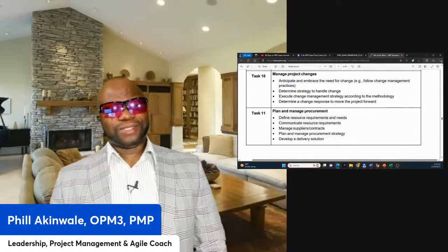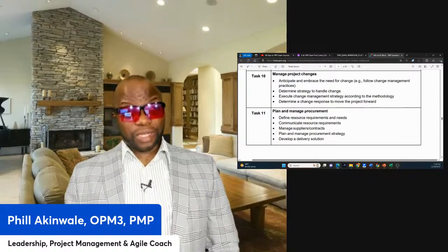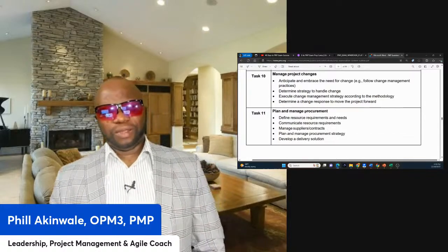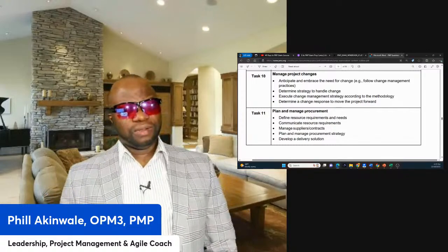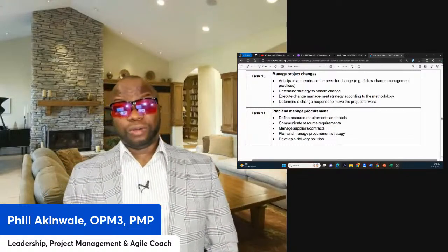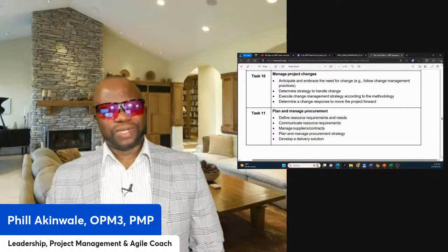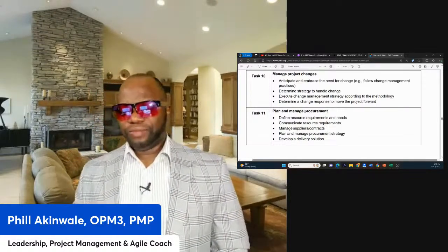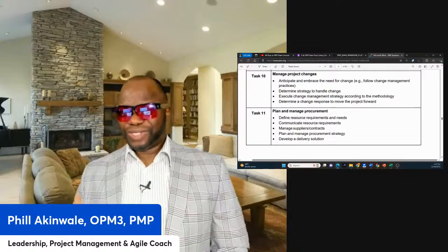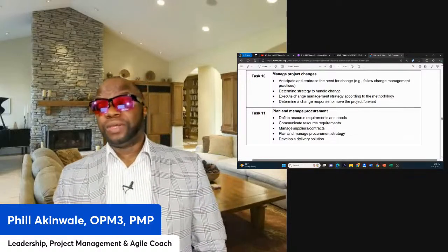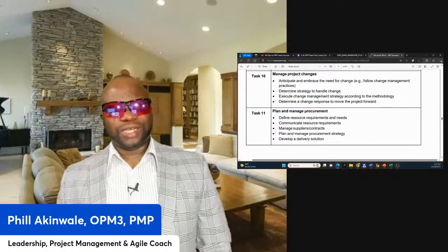They do the analysis. They take a look. They could be back and forth between you and them or the customer and them. They may negotiate other things with the customer, but ultimately there's going to be a go or no go decision in this case. Should we go ahead with the change request or should we not? And if they don't go ahead, then you still document the outcome in the change log. You still share the change log. If they do, you still document it in the change log. You execute it, but you need to share the change log.